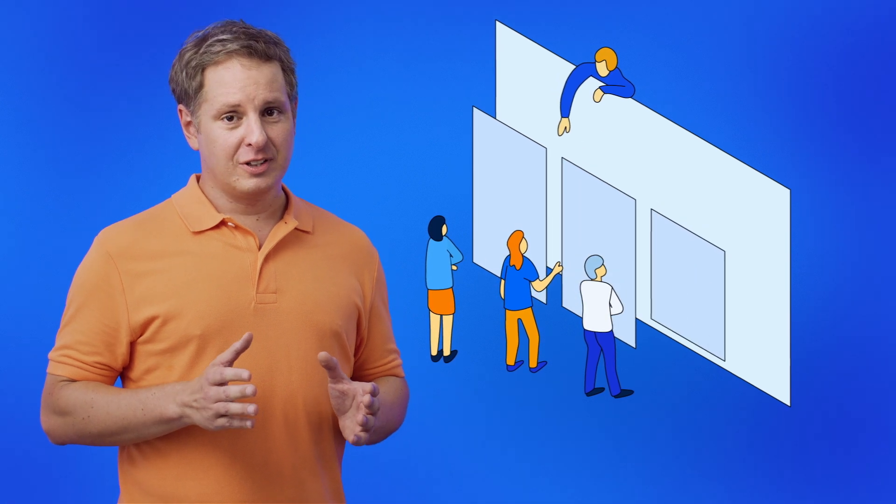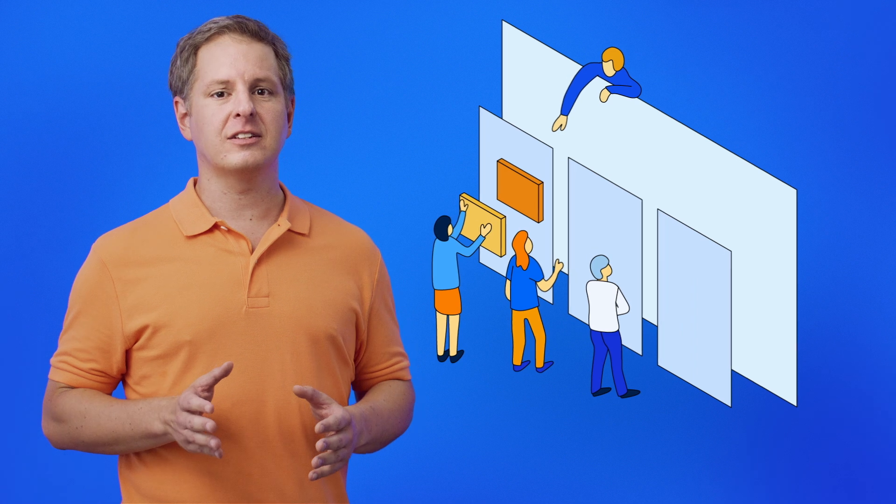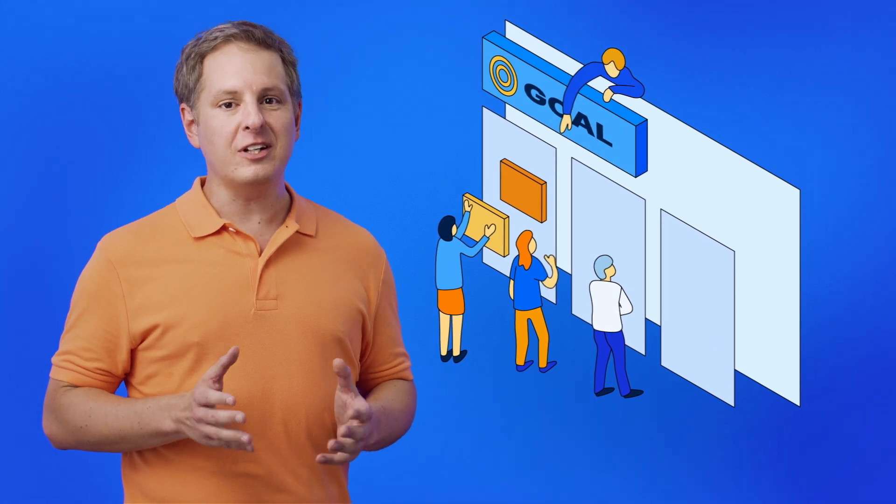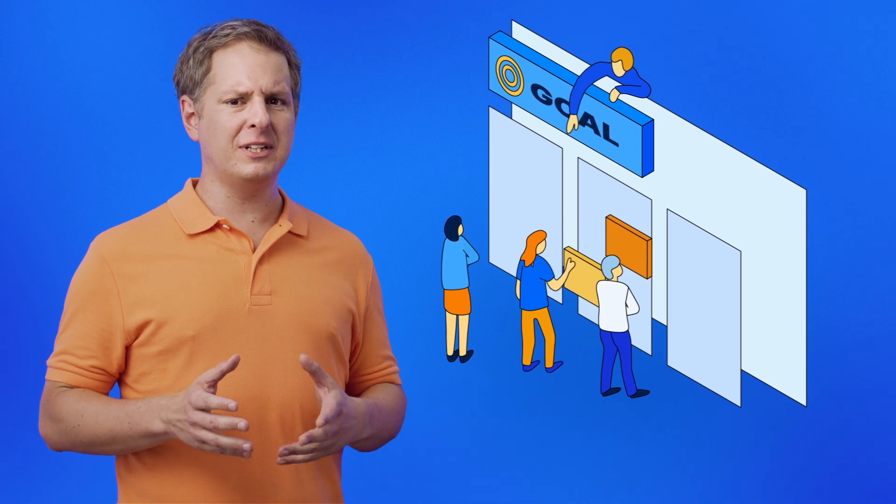Instead of rigid workflows, represent the work in your sprint with small, few-hour-long tasks. Always visualize the sprint goal and collaborate daily towards achieving it without being limited with columns and silos, and focus on creating value.